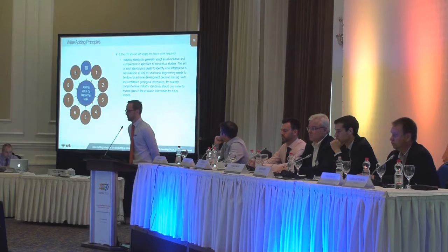And lastly, as I've mentioned before, a very important part of a conceptual study is to set scope for future work. Often it is implied that we set scope by investigating a project in early mine development, but it's also important to actually work out what exactly the scope is, how much it is going to cost, and what needs to be done in future studies, and have that documented as a means to make an informed decision to continue with the project to the next phases.